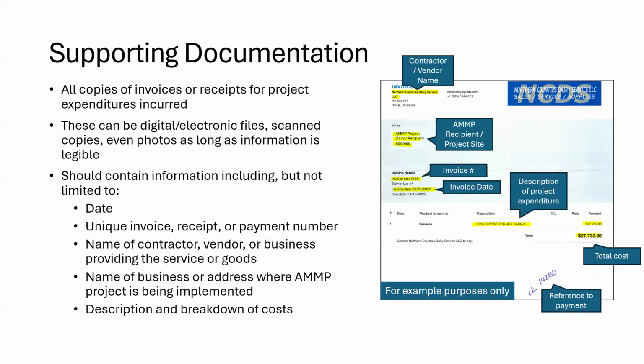If there's labor involved and it was broken out in your original project estimates and budget worksheet, there should be at minimum a breakout on the vendor invoice as well for the portion being charged, that is labor versus everything else, as the AMP program has a limit on how much of a project's grant funds can go towards contractor labor. You can also add notes to these if needed to help clarify the contents for the program, which can assist with the review process.